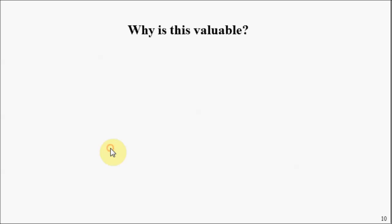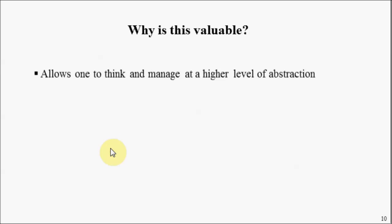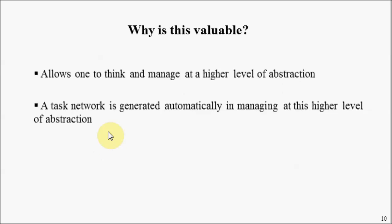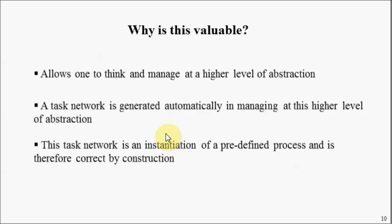So why is this valuable? We've demonstrated the ability to think in terms of a higher level of abstraction. If we've predefined an entity such as a house and instantiate it, we automatically get its definition instantiated for us. A task network is generated automatically from this higher level of abstraction — we're able to create a PERT chart by instantiating this process definition. And because we are instantiating a pre-defined process definition, the project plan is going to be correct by construction.